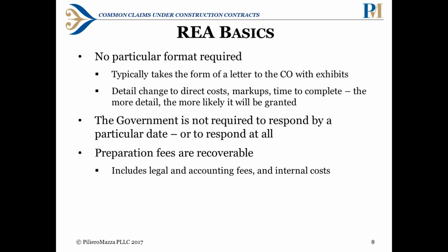So as part of your REA, in addition to the increased costs of performance or time that you're requesting, you can also include your legal and accounting fees or internal costs that you incur in preparing the REA. One other thing is that an REA doesn't have a certification requirement that the REA is accurate and made in good faith, except for DoD contracts if the REA value exceeds the simplified acquisition threshold.